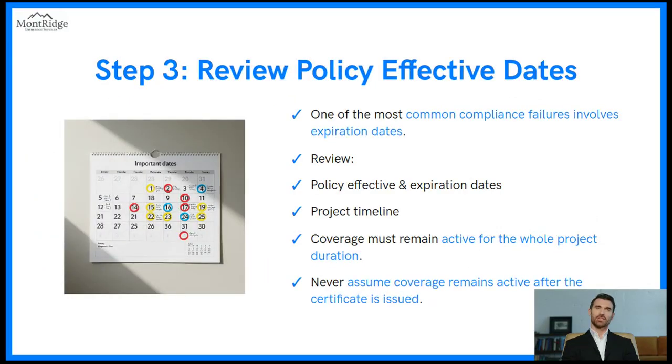Step 3. Review policy effective dates. One of the most common compliance failures involves expiration dates. Review policy effective and expiration dates. Project timeline. Coverage must remain active for the whole project duration. Never assume coverage remains active after the certificate is issued.